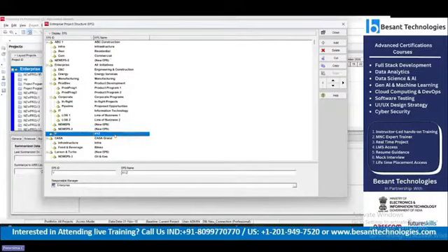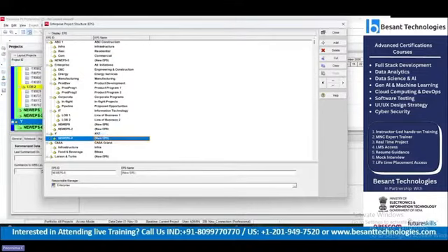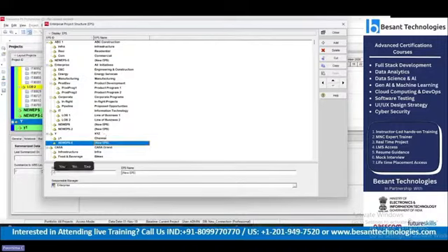So further, programs have to be created, right? For adding programs, I'm adding a new one. Automatically, below XYZ, a new one is added. That is nothing but the program. I'm mapping the program as Y1, and I'm mapping the locations alone. Y1 is Chennai. Further, I need to select the main EPS and add, so that a sub EPS is created, mapping it as Y2 and Delhi.